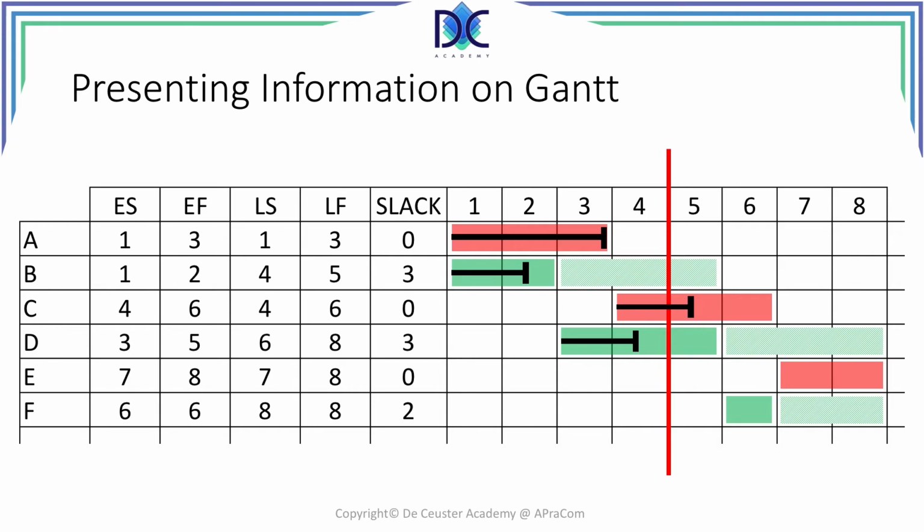Task C, well, this is very good because we already finished more than what we expected. We are already at 50% after working one period on the activity. So probably the activity will finish at the end of week 5 or period 5, which will lead to a reduction of the project duration because activity E will be able to start sooner. Again, we have to be careful. What are the consequences of this situation?